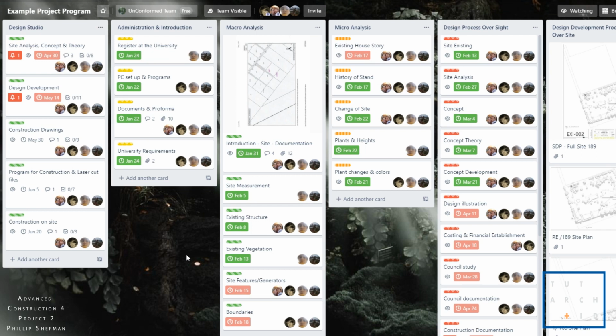What you do need to do is think of headings and subheadings for certain tasks that need to happen in the project. If we look at the SACAP breakdown of the 6 stages in the architectural profession, it's from stage 1, which would be inception, all the way to stage 6, which would be closeout. During those 6 stages, as a practicing architect, you would break that up into certain dates, weeks, time frames and deadlines that you would need to get the project underway.